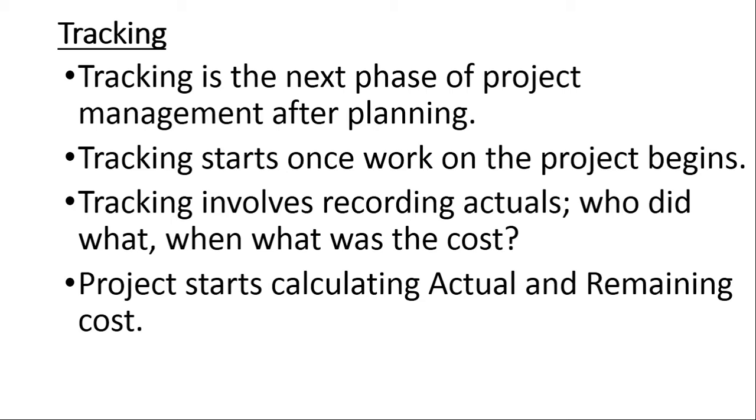Tracking involves recording the actual values. We want to record who did what, when did they do it, and what was the cost. Then the program, MS Project, will start calculating the actuals and what is the remaining cost.